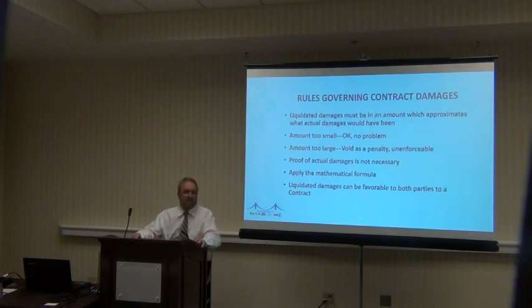Right. Anyway, further comments, questions on liquidated versus actual? It's a really important area. You won't spend a lot of time on it, but you need to pay attention to it in your contract. Just quickly, if the amount is too large, it's voided as a penalty, unenforceable. It may not be enforceable, but there's probably still an owner's claim, right? Probably back to actual damages. Right. Same rule, you don't have to have an actual damage clause to make a claim for actual damages. So if you can't make a claim for liquidated because it's void and unenforceable, then you move back to the actual damage claim.